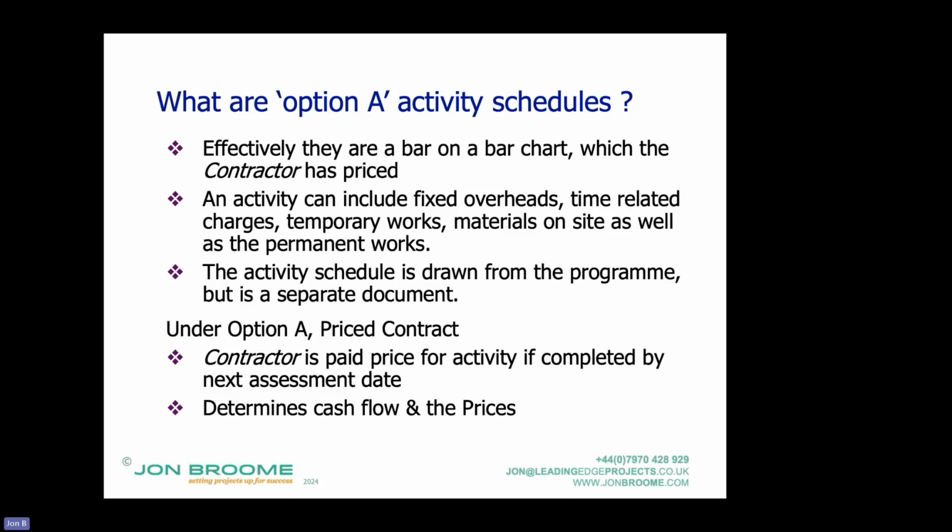So the contractor takes this scope, breaks it down, does a work breakdown structure, arranges that in a program, but they only get paid for completed activities. So if there's a 3-month earth moving activity in it, or a 3-month whatever activity in it, they would not get paid until they finished that 3-month activity.